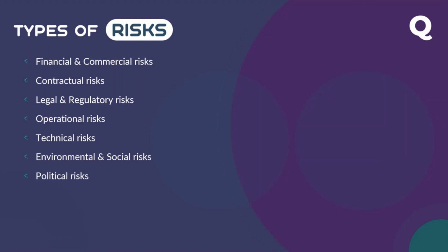You will look whether there is an advance payment provision or not. If not, that is a risk, because for your initial mobilization, you are not getting money. As a contractor, you have to fund initial mobilization yourself. That's a big amount of money. That's a commercial risk you can identify during pre-contract.